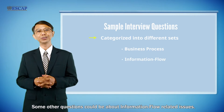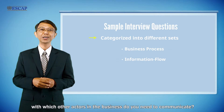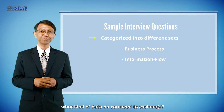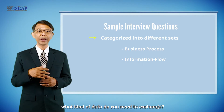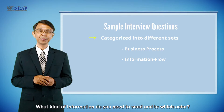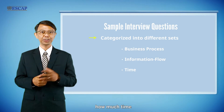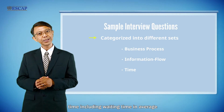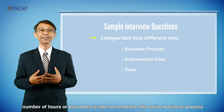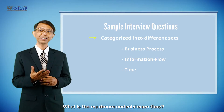Some other questions could be about information flow related issues — for example, with which other actors in the business do you need to communicate, what kind of data do we need to exchange, or what kind of information do we need to send and to which actor. There could also be questions related to time — for example, how much time including waiting time, the average number of hours or days to complete the entire business process from beginning to end, or what is the maximum or minimum time.